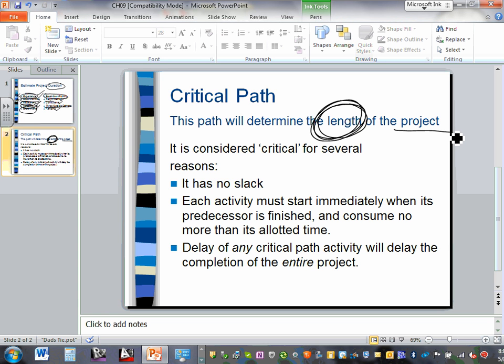Now, as a project manager, when I draw that, I say, well, he's overloaded. In order to cut the project length by 10 weeks, what if I double him, clone him? I can't clone you, so what I can do, I can hire another person and split your path in between, 50-50 between you and another person. Am I making sense, guys? They call this relieving the critical path. Okay, so that's your critical path.